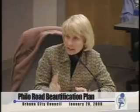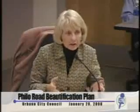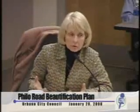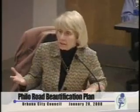Well, I will say that what Bill has proposed is delaying two projects, and then $50,000 for the sidewalks out of the fund that we already have, and then the remaining 100 is yet to be determined. But that could be approached with the use of add alternates, so that if the construction budget comes in under, then you've got that 30% contingency that could be used for those add alternates. So I think we're sitting a little prettier than what we might think, given what Bill's proposed in terms of delaying some of the projects. And it wouldn't be that these projects would not be done. It would simply be that we as a council would be choosing to prioritize them.